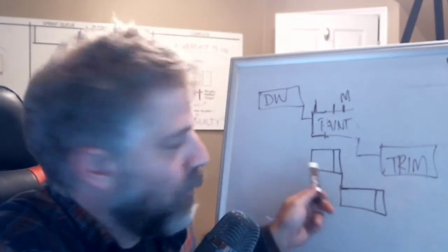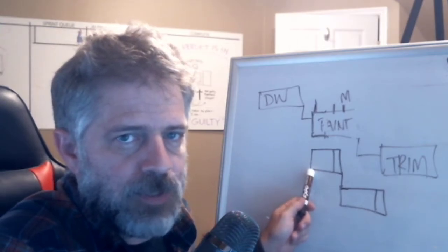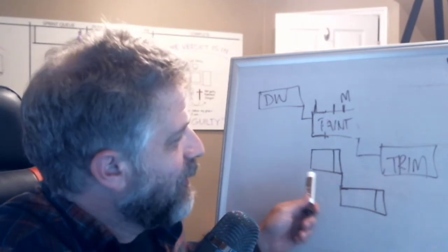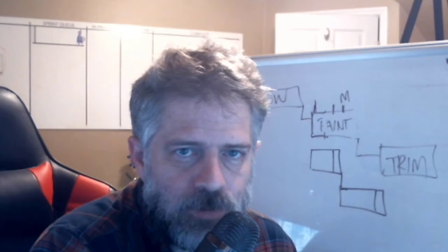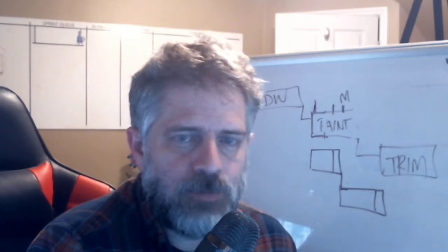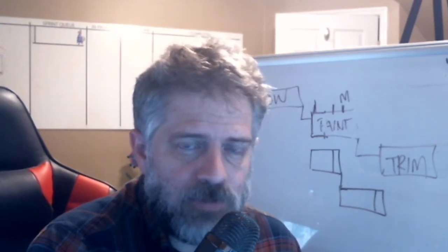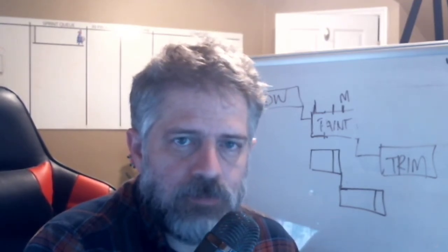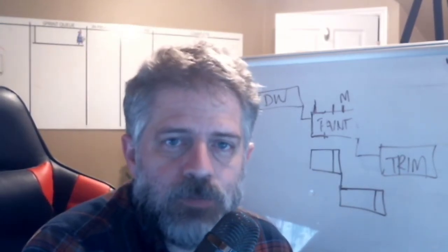And then when he calls me and tells me, and I'm not picking on painters, I'm a painter. That's why I'm picking on painters, I guess. But when he calls me and tells me I can't come on Tuesday, I can say, we talked about it, it was going to take 4 days, and we're starting to eat that 2 days of margin immediately. And I'm concerned about that. Can we go ahead and get started? I would rather leave that margin for the end. Because we did talk about it.